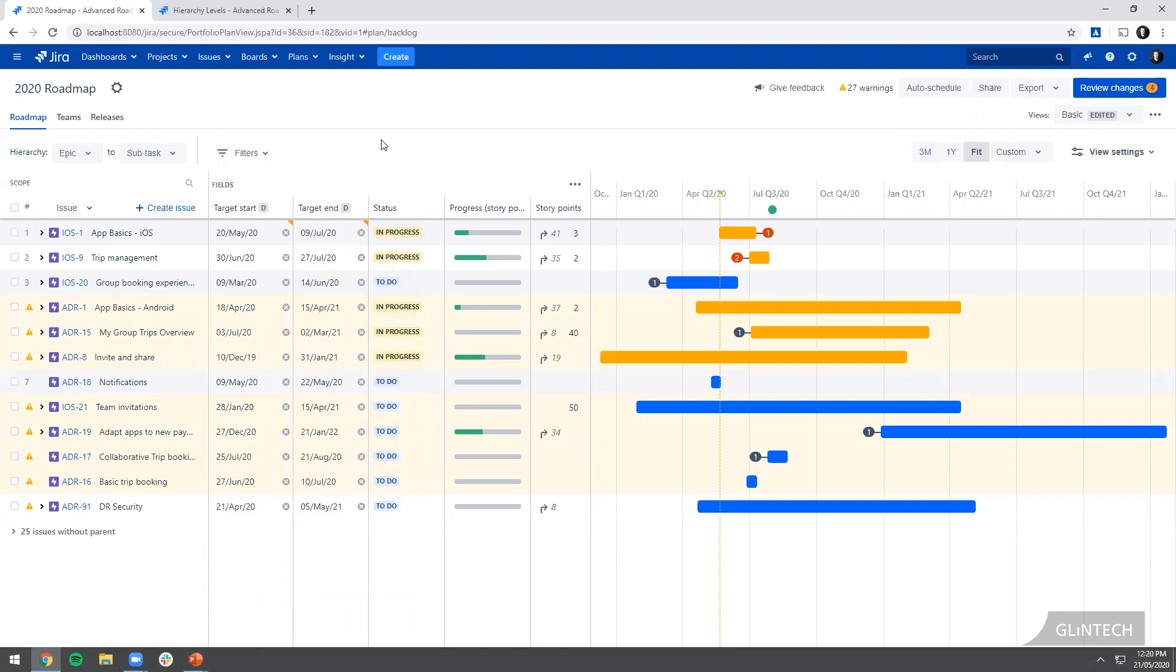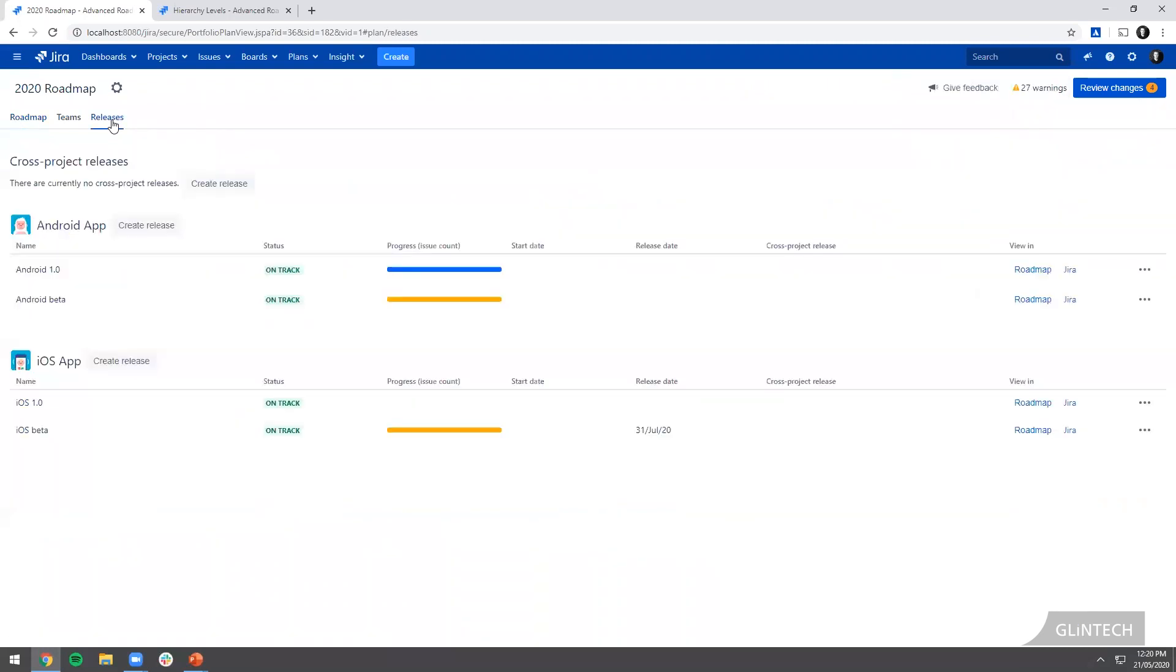The other thing that's really useful is the idea of releases. Once you've got used to working with dependencies, I would then introduce the concept of releases, or versions as they're sometimes called in JIRA. Frustratingly they use different names in different places. Sometimes a lot of people are put off by using them. The word release is very software-heavy, but really what it's saying is it's a milestone or a deadline. Any point in time that you've committed to your client that you're going to get some work done by, we use a release for that.